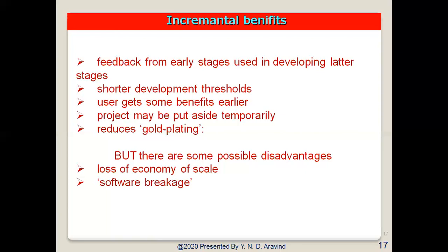Here the overall requirements are defined before proceeding to the evolutionary mini waterfall development of the individual increments of the system. Or we can say that the initial software concept, requirement analysis, and designing of architectures and the system core are defined using the waterfall approach, followed by iterative prototyping, which culminates in the installation of the final prototype. By using these basic principles, we go for the incremental model.